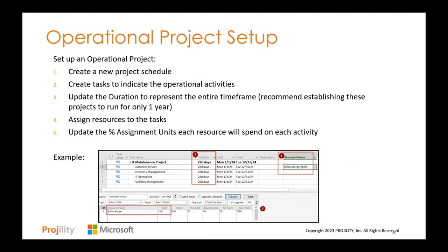Operational projects also allow you to get more from a reporting perspective because this project has its own project level metadata, task level metadata. You have the ability in reporting to create some metrics on what percent of my resources' time am I planning on them to spend on project versus operational? And if your team is doing timesheets or tracking actuals, what time did they actually spend? So you get both of those metrics in terms of your planning and then comparing that to where the team did spend their time to see if you need to make any adjustments.